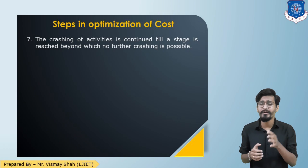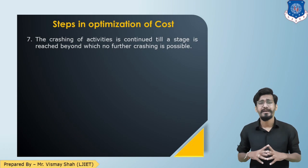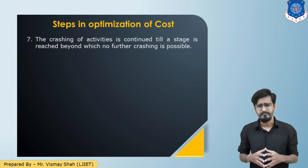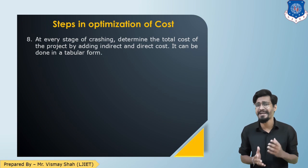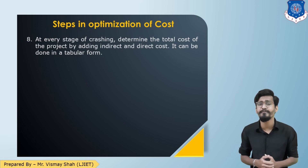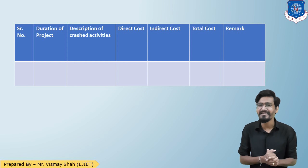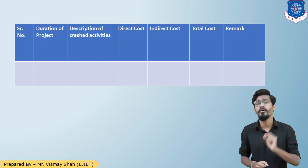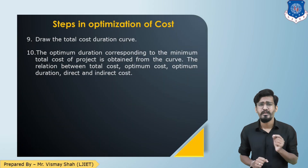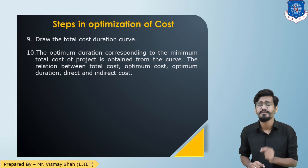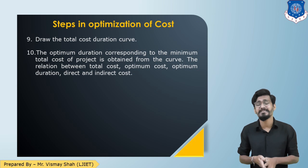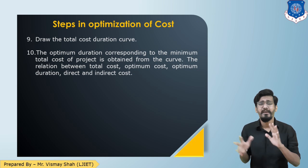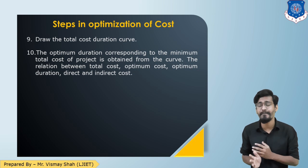Continue until you reach a stage when you cannot reduce the project duration further. At every stage of crashing, determine the direct cost, indirect cost, and total cost. Prepare a summary table, then draw the total cost curve. The optimum duration and optimum cost are found from that graph.